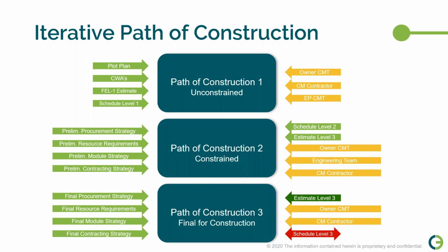Lastly, and most importantly, like I mentioned a few minutes ago, lock it in at the end of FEED, at the end of FEL3. Don't keep changing your mind. Give the engineering and procurement teams a chance to deliver on the plan. If you keep changing your mind, it's not going to go anywhere, and they're going to lose interest in trying to adhere to a path of construction that you're not sticking to. So avoid calls to change the path of construction.